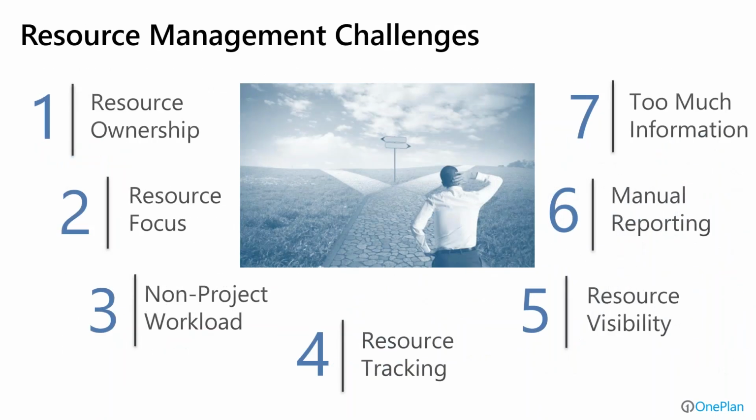So what are some of the resource management challenges in specific areas? One is resource ownership, especially in matrix organizations today. Project organizations often have demand for resources and request resources that actually have to come from functional or resource management organizations that then have to allocate or provide the resources that are being requested. And that resource ownership can provide challenges or barriers to productive execution.